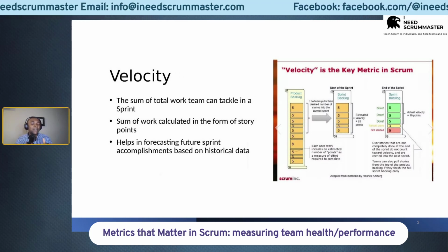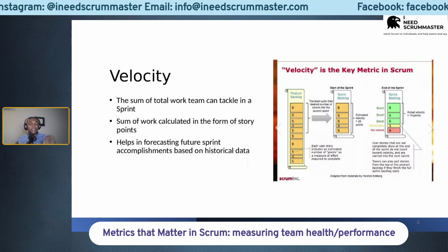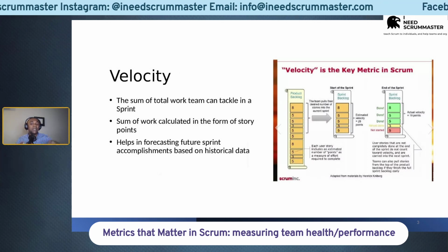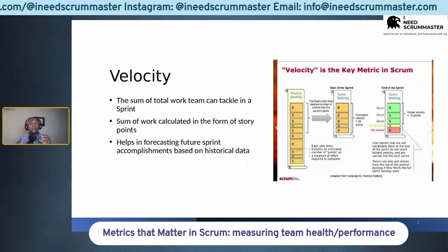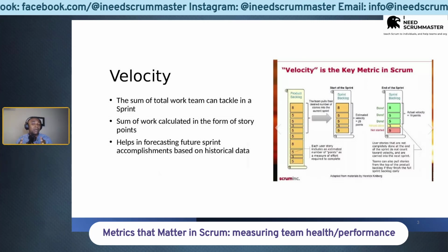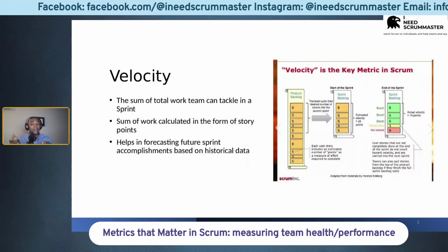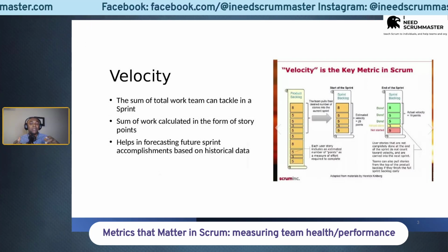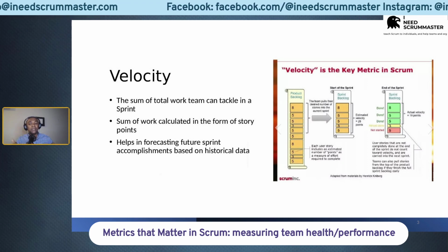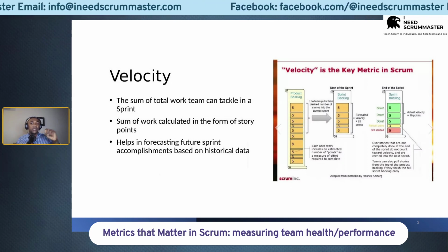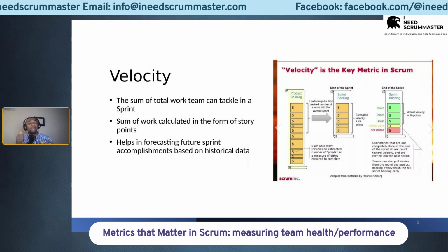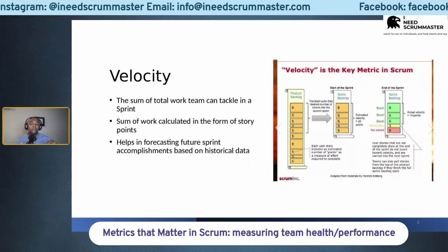Now, the same thing applies in Scrum. Before the start of a sprint, or when the team members are doing their sprint planning, one of the key things that the Scrum Master will keep in mind is velocity and capacity. Capacity is the availability of resources in terms of team members, in terms of holidays, all of the holidays and vacations. Then velocity is the total amount of effort.